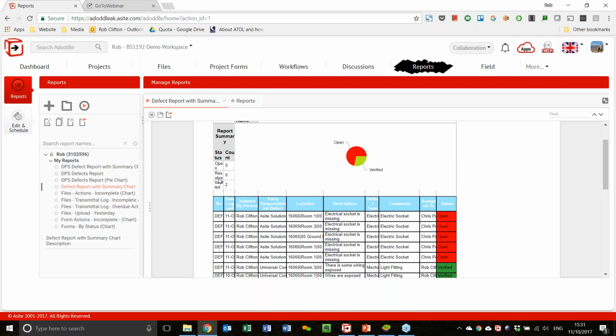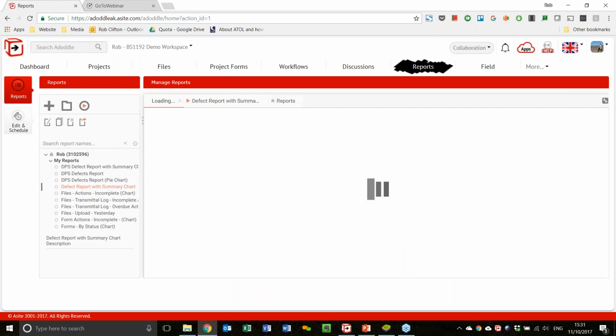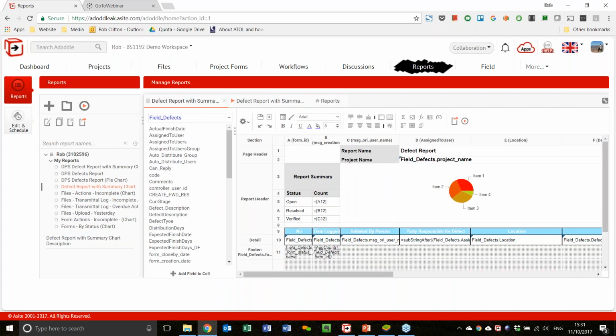Now, as I mentioned, the strength of the reporting is that you are able to edit these to the nth degree. So I can go into this report, edit this, and I can define such charts for specific contractors, for example. I can define it for specific time frames. So the amount of information is really, really valuable to me. It allows me to start going into the real data analysis of the snagging. For example, how long is it taking me to snag and then close out and verify an apartment? So I know from the point that the construction is completed a fair estimate of how long I can expect snagging that kind of typical area to take. So the information in Asite and the ability to then pull that out and analyze it is also really, really important.